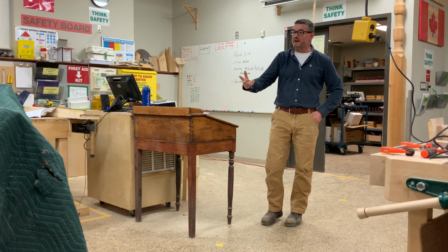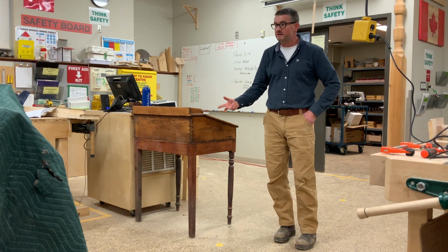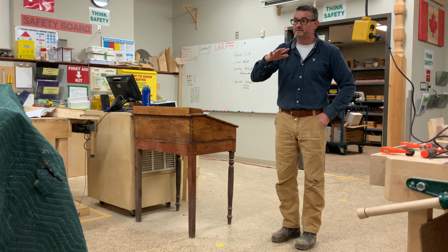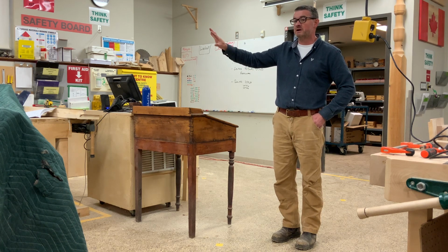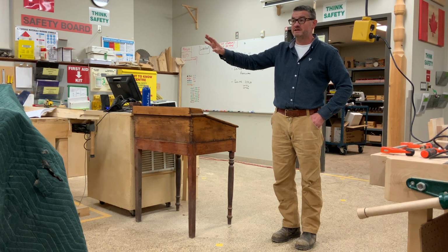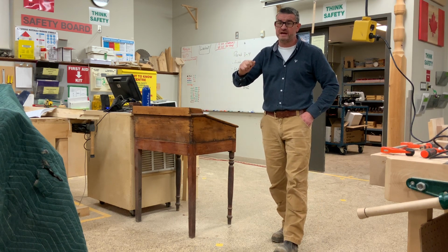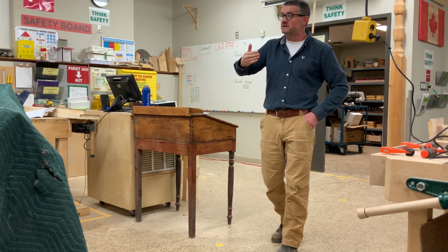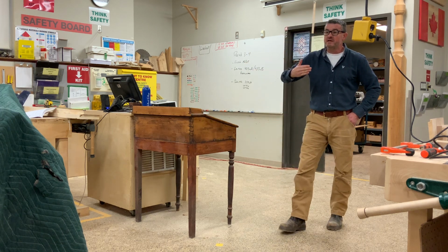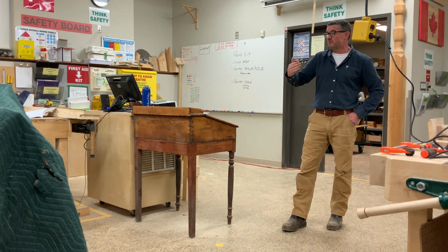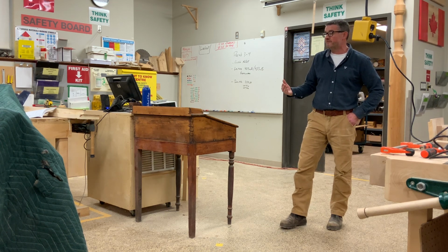In other words, if my plumber doesn't show up for a week, this job stalls for a week because we can't put the gyprock on, we can't move forward. Do you know what I'm saying? So we call that a critical path or a critical step. Each one of those things that's on the calendar, if it doesn't happen, we can't move forward, that's called a critical path. That plumber must show up and must finish their job or we can't move forward.